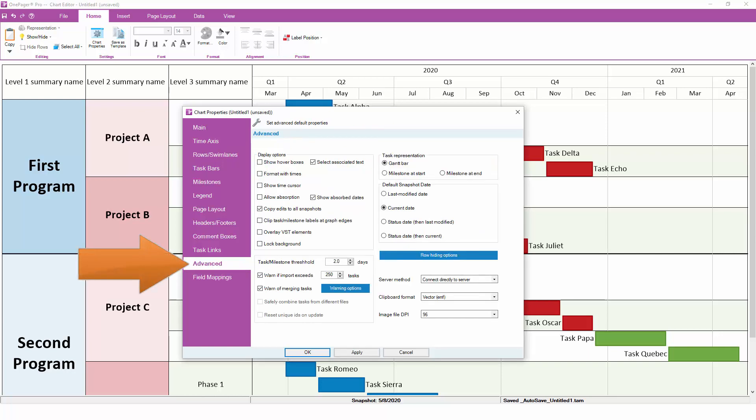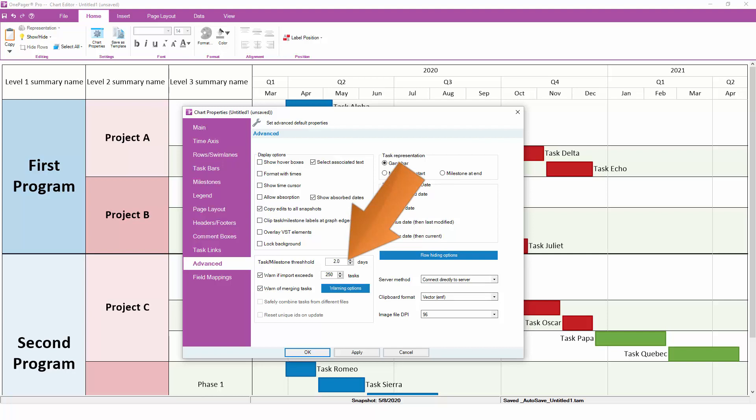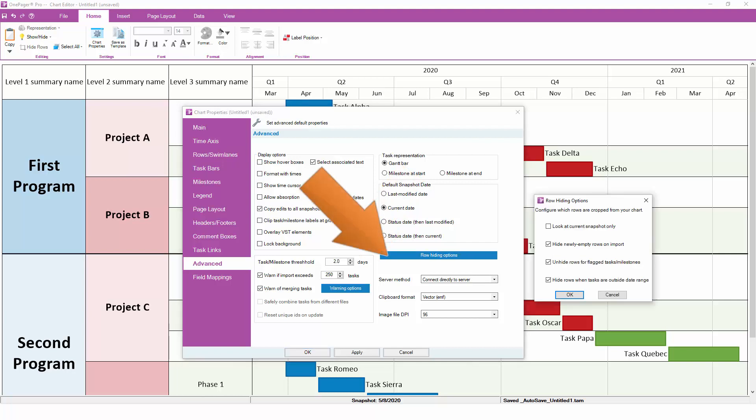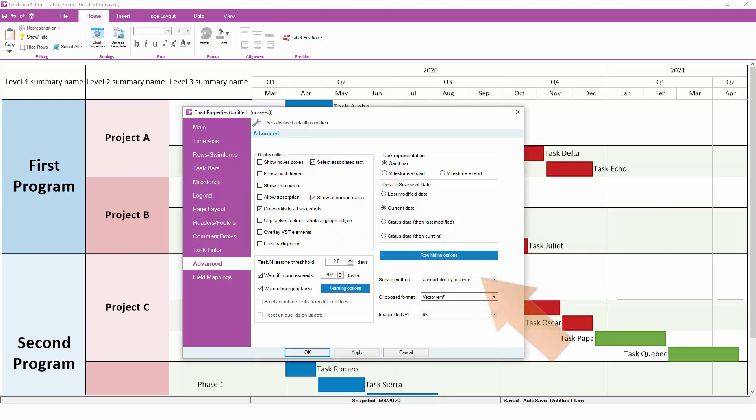Finally, the Advanced tab contains all of the settings that casual users tend not to change, but experts use all the time. Popular choices include the Task Milestone Threshold, which converts short duration tasks into milestones automatically, the ability to hide empty rows in certain conditions, and expert level connection options for Project Server and Project Online.